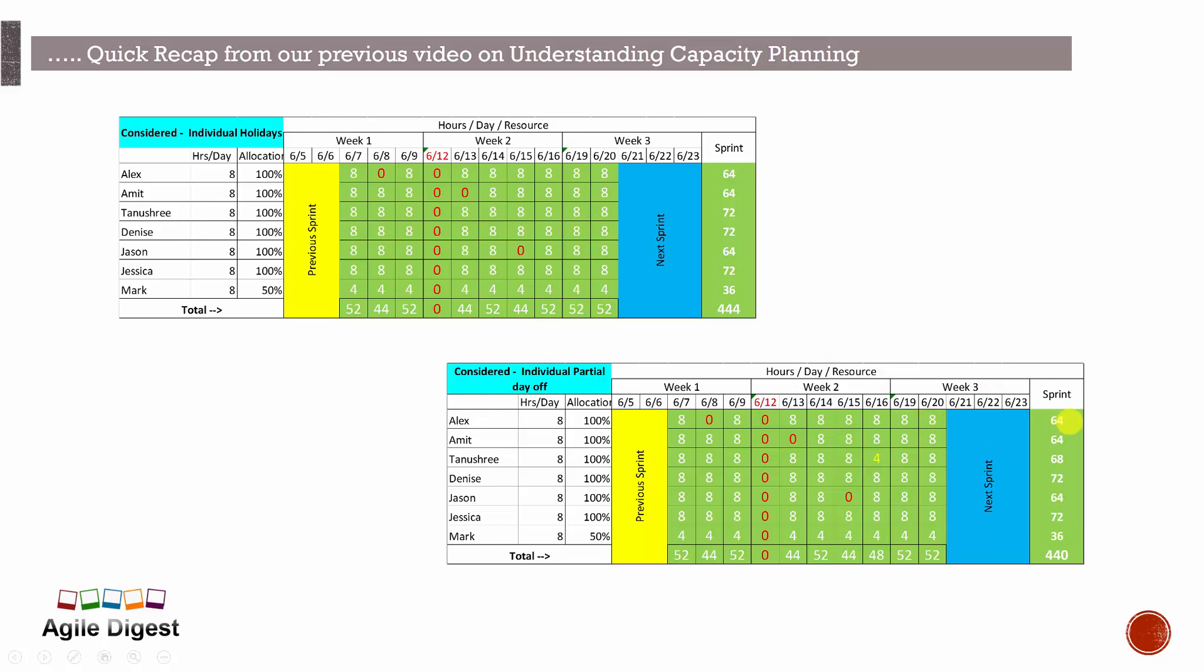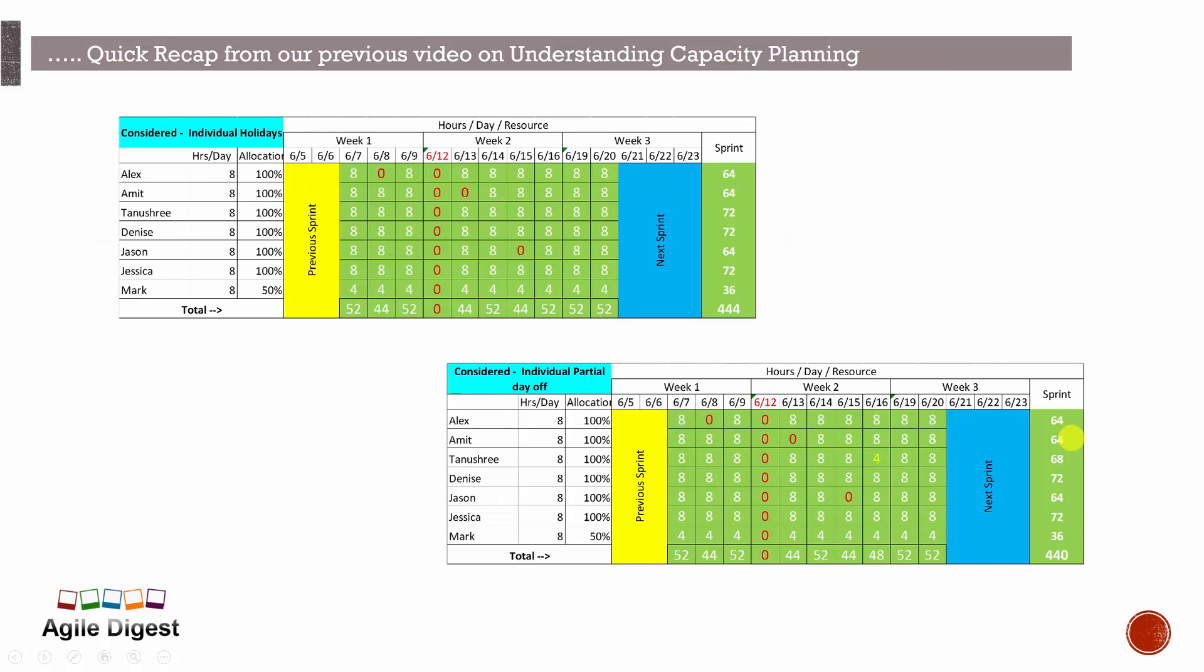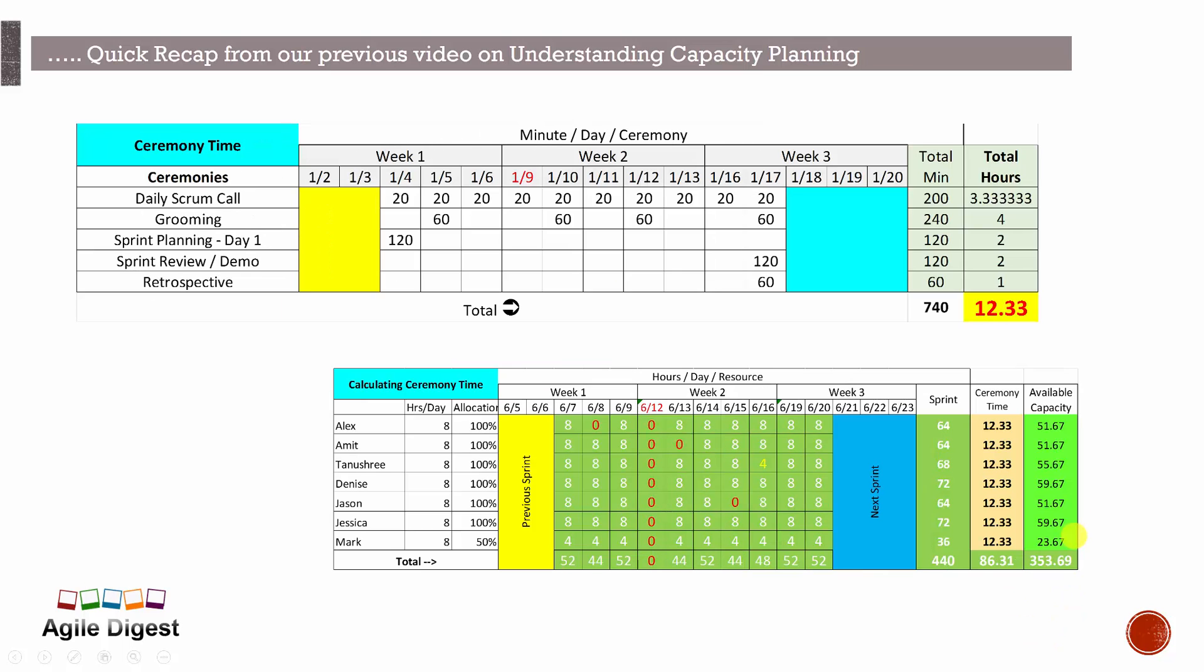So the capacity is coming up like 64, 64, 68, 72, 64, and that way total of 440 hours. Now we'll be calculating the ceremony time, so how much we are actually putting our time into conducting all the ceremonies or attending all the ceremonies, different meetings.